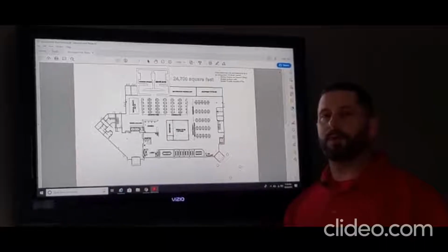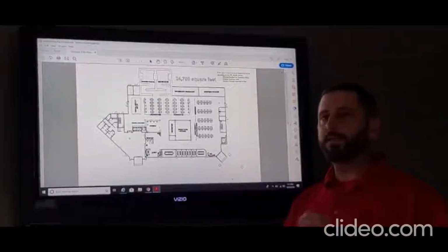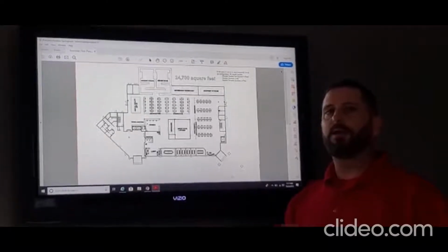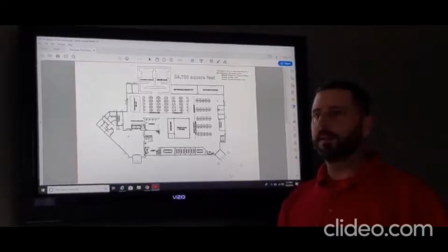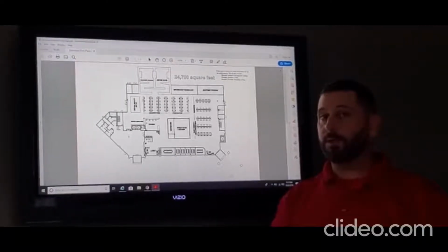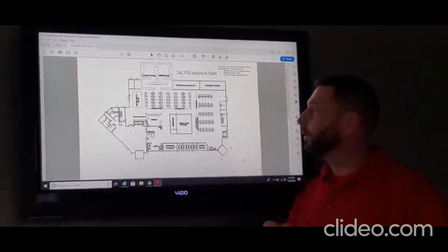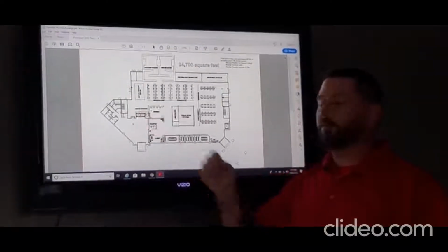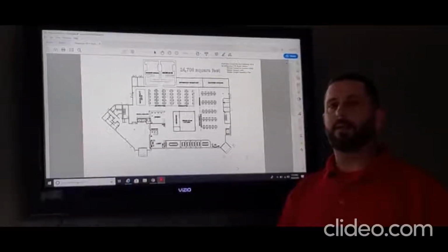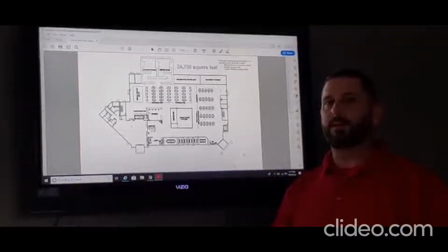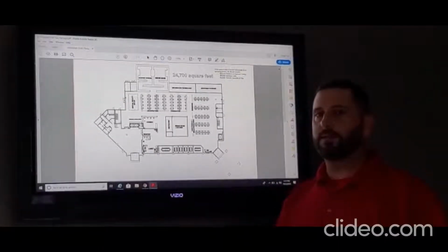If the subcontractors have a question about an item, they can instantly contact a contractor who can instantly contact part of the design team and get through the mistakes or issues instantly without hesitation. We also feel that our virtual reality setup will allow people to see what they're getting before they actually get it. This will help eliminate change orders and cost overruns.